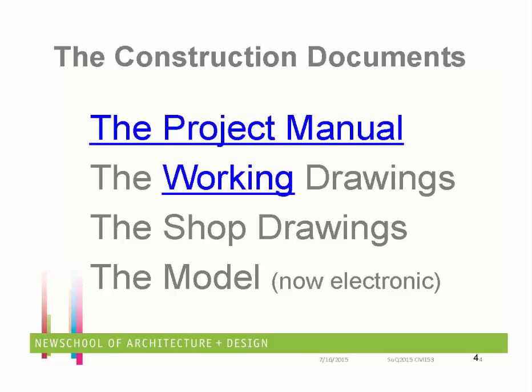So they end up doing what are called shop drawings, which, for the plumber, maybe his shop drawing is nothing but the shape of the floor with a bunch of holes and dimensions of those holes to physical elements that will be in place at the time the guy goes out there. Okay? So somebody has to do those drawings. They do shop drawings so that the plumber knows where to put the blockouts for his plumbing.